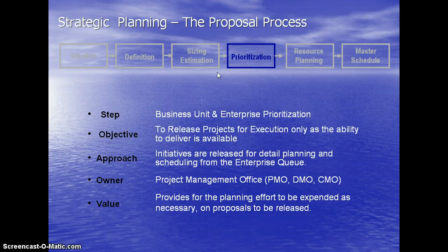At this step, the planning horizon now determines when we can do more work. This is demand management, capacity planning, or whatever name you use for it. We are going to put more effort, which means more money, into the evaluation and assessment, so let's not spend more time planning than we can take advantage of. The enterprise selection here follows the authorization, which means we have both the financial budget and resource capacity to schedule the execution of the next project.